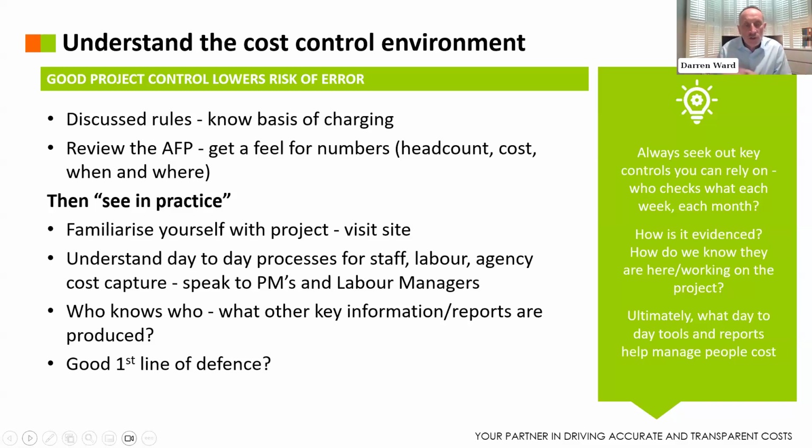Do you conclude that you've got a good first line of defence, that your main contractor is doing everything they can to provide right first time costs? So your tip here is you're trying to seek out what key controls, what checks and balances you can rely on. And the more you can rely on, the less you need to do detailed inspections, or the less you need to do repeat inspections. And it's starting to make your work much more efficient.